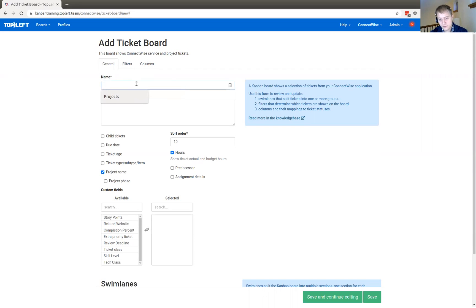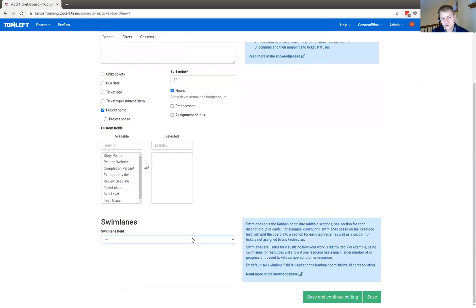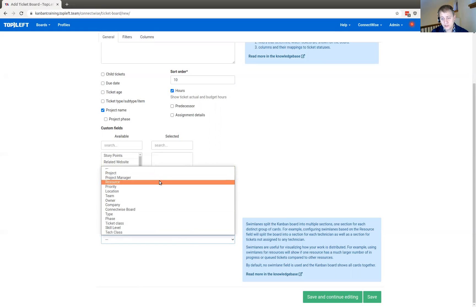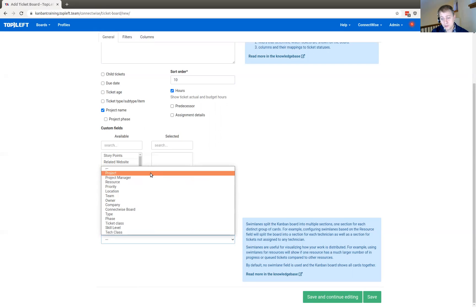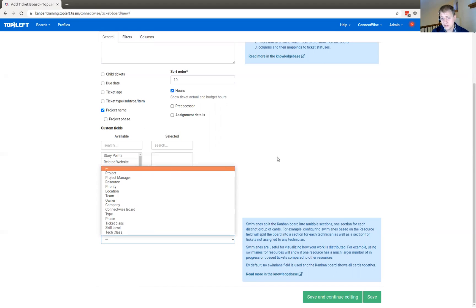Each Kanban board needs a name. These options have to do with which fields appear on the cards on the Kanban board. You can select which custom fields to see and your swim lane. Swim lane has to do with how the tickets are grouped together. A common choice is to see how tickets are assigned to people — that means you see one group for each member of your team. You select the resource for that. Another common option is the project, so if you're looking at project work and you want to see tickets by their project, that's the swim lane you want to use.